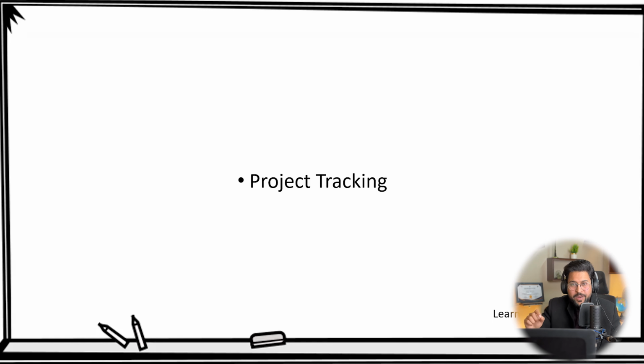They are going to document each and everything on a daily basis: how much excavation has been done, how much welding has been done, how much work has been done today. On the daily basis, they are going to send it back to you, and you are going to take that data, compile it, update Primavera P6, and then develop progress reports on a weekly and monthly basis. It depends on your project contractual values, which the client has already mentioned, right?